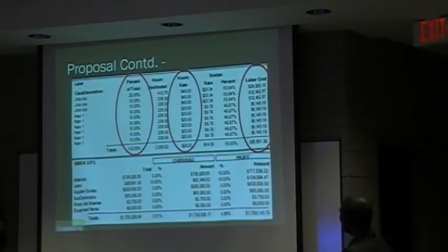We have, this is still part of the proposal continuation. This is the total percentage for the labor cost. The labor percentage: when you add the total input of each worker together, it must amount to 100%. The journeyman here put in 20%, and for all other people we can see the percentage as they work, and we added up to 100%.